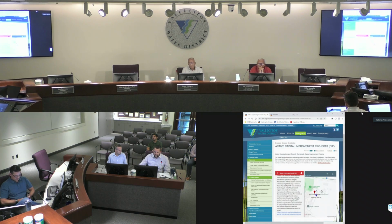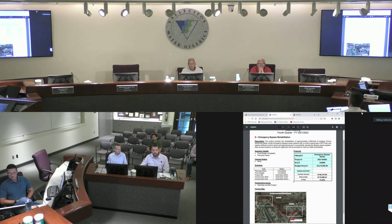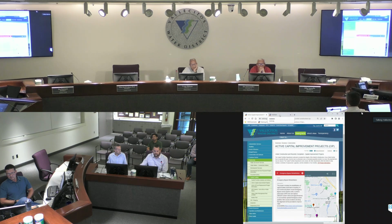The other one I wanted to showcase today is another priority project here at the district, the emergency bypass rehabilitation project. I can share that this project is currently out for bid advertisement. We've gotten a good response from local contractors expressing their interest in this one. So we are through design. It's in bid phase now, and we expect to open bids later in August, late August. And when that gets going, we'll be very busy, not just on an inspection standpoint, but design and CM as well during construction phase services. Okay, and those are the only updates I wanted to give the board members at this time. Do you have any questions on the quarterly update? No? Okay.